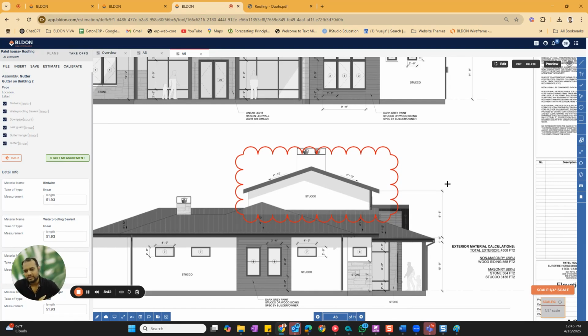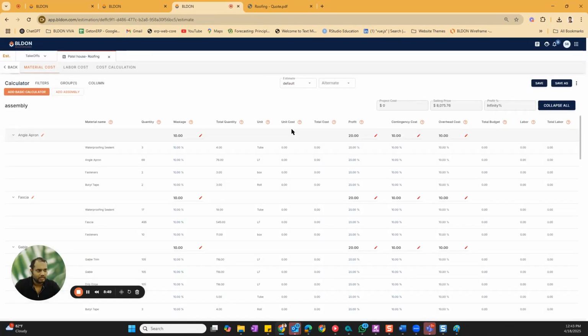And on top of it, we store all your material pricing where you can get all those pricings. Yes, I did not talk about one more item: you can even have a labor installation cost. Let's say this wrapping seems to take an hour to install. You can update that over here, that it takes 1 hour, and based on the quantities, it can multiply it and give you 4 hours, right? So whatever quantities you are plugging in and the formulas you are creating, you can make use of that.